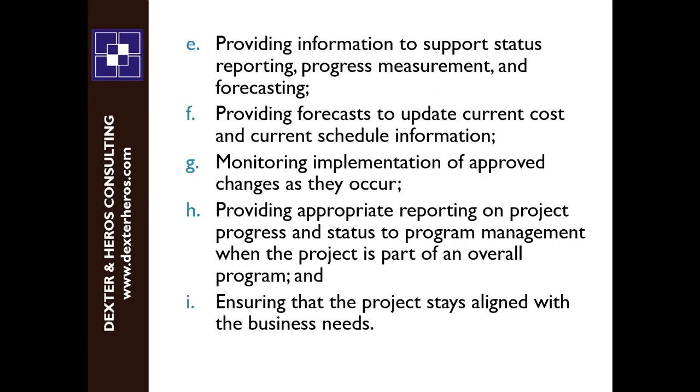And that report can also help you to forecast. Monitoring and controlling is also the period you need to forecast. You need to see how things are going on in your project, and you can predict and say, okay, we didn't complete this activity yesterday, we didn't complete it last week. If we keep working in this manner, we need an additional 2 weeks or 3 weeks for us to finish up our work. That's forecasting. That's you being proactive. That's you looking ahead. That's you comparing what you have done to what is in the plan, the time you have spent on the project so far compared to when you are going to deliver the project.